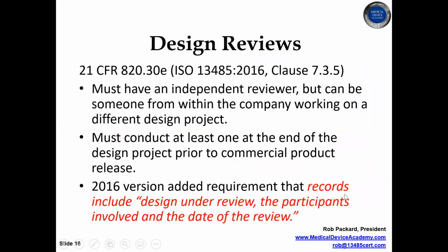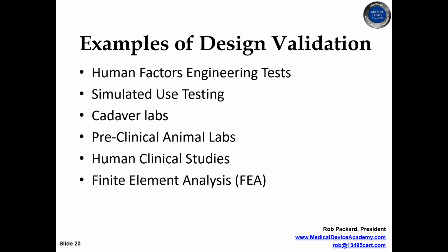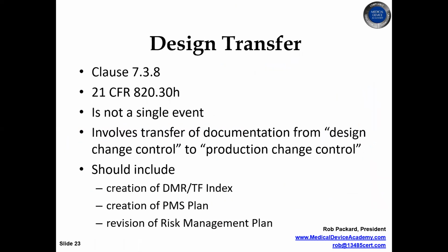So let me go back to design transfer. Okay, so clause 7.3.8 is where we have design transfer. It's not a single event. And this is the stage where you would create a device master record and a technical file index. If you're smart, you have these as the same document. So it's an index. You're allowed an index for both of these. And you could have it serve double duty and just approve one document instead of two, save you some paperwork and a lot of revision and maintenance.